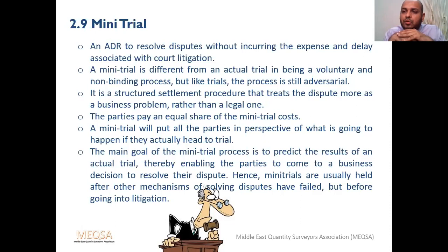At the end of the day, what will happen? Okay, he will give a decision. Is it binding? It's not binding. If it is not binding, why are you going for that? So such arguments are there. So a proper agreement has to be made for all the alternative dispute resolution, because these are not forced by the law. This is your reference or your intention to go with. So both parties should agree in case of his decision: is it binding, or what is the next level?